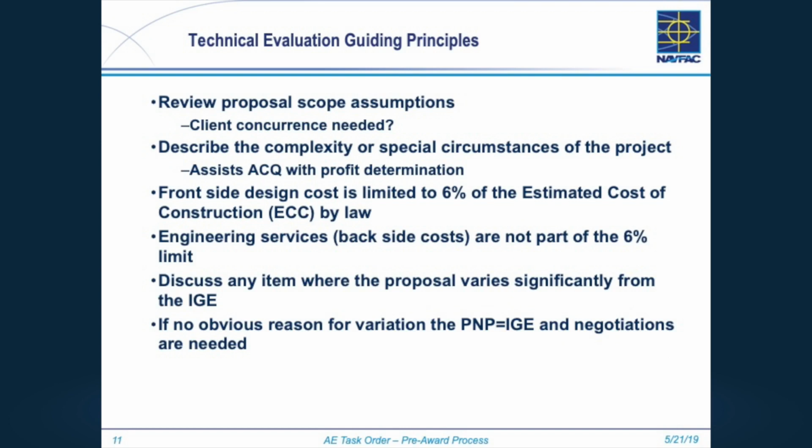All right. First thing you want to do is review that cover sheet. Yeah, I know it's tedious, but a lot of times our AE sends in scope assumptions. You need to read those. Maybe they said, we can't do this on your schedule, we're going to deliver it 6 months later. That's key to whether it's acceptable or not.